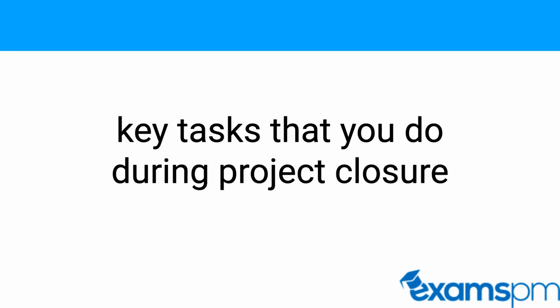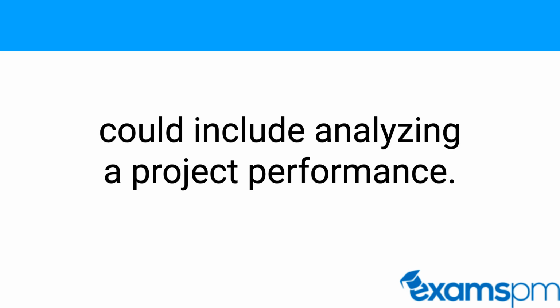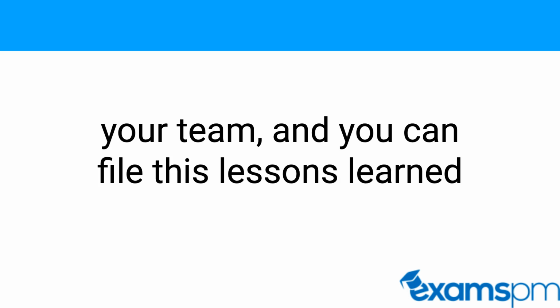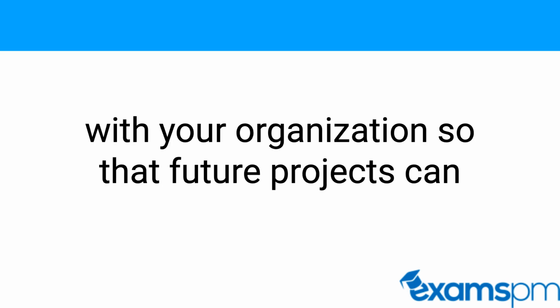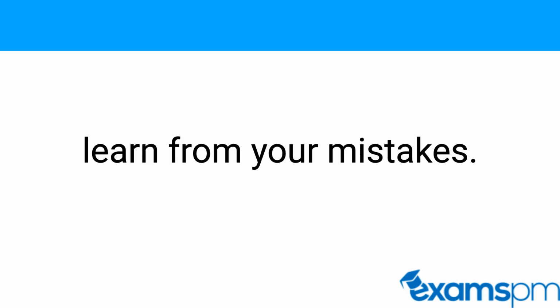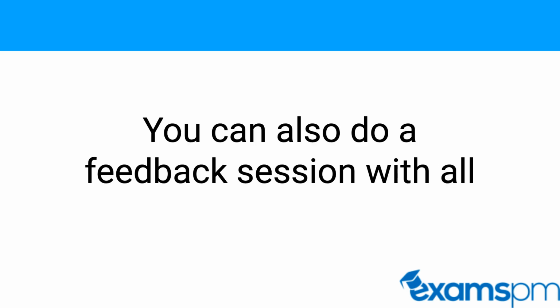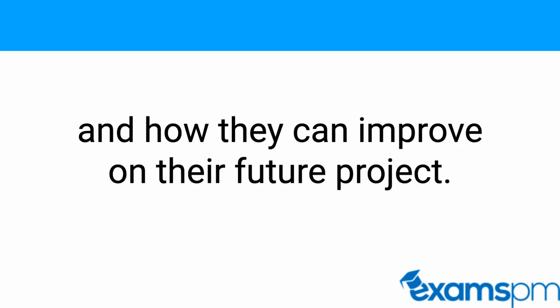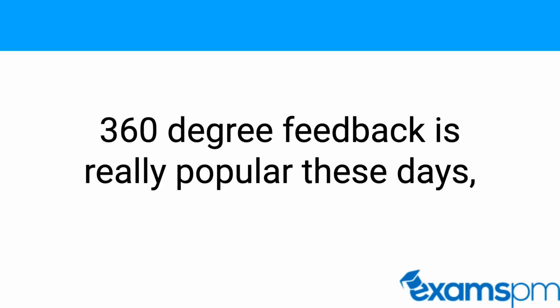Some key tasks that you do during project closure could include analyzing your project performance. This is where you do a lessons learned with your team, and you can file this lessons learned with your organization so that future projects can learn from your mistakes. You can also do a feedback session with all of your team members, letting them know what they did well on the project and how they can improve on their future project.